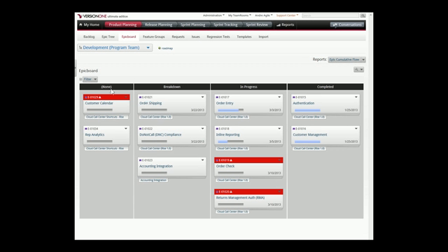I think the Agile community initially with the burn downs had a strong desire to really use working software as the way that you would say, here's why we're healthy, because we've delivered something to you. That's the concept behind a release burn down, where you're saying we've delivered stories that are showing you our progress, as opposed to we've done some activity.